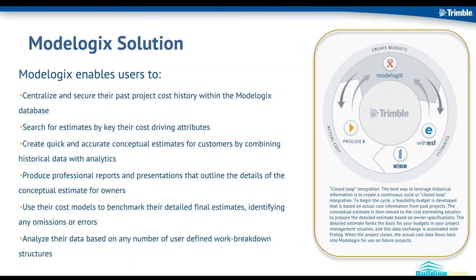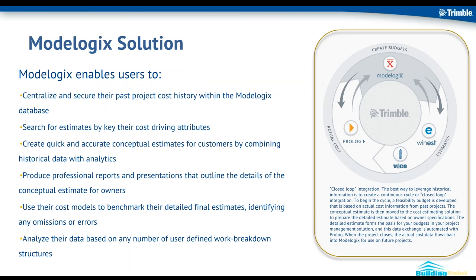You're going to tag it or attribute it with all, which we call smart categories, with all of the key cost-driving attributes that you want to store for all your data. Therefore, when you're looking for, on a future opportunity, you're looking through your past library of projects, you can search for projects similar in scope based on those attributes that you tag with the data. The data is structured, it's attributed, which allows you to quickly and accurately create conceptual estimates or cost models within the Modelogix application by taking that historical data and combining it with some of our analytical tools and functions that are built into the software.